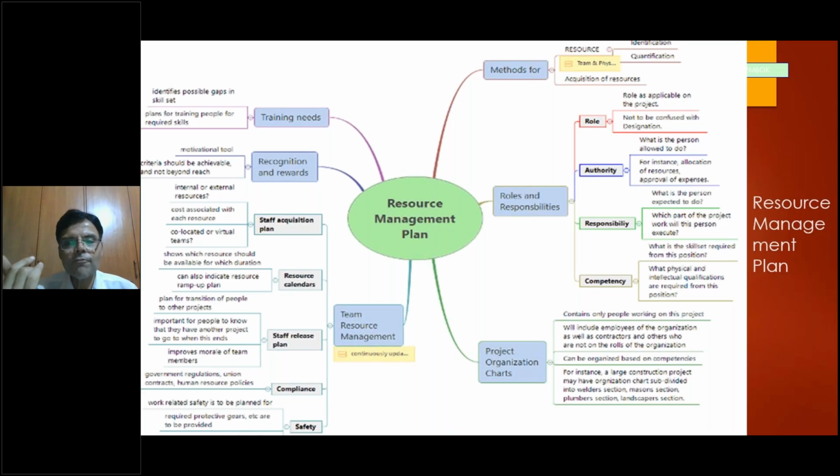First, what kind of people, type of people; quantity will come later. What kind of role will they play? What kind of responsibility do we assign to them? What kind of skills and competencies do they come with? When would each be required, each role, as a typical resource calendar. Each role through this three-year period, which role is required for how long. This detailed planning created a basic framework, the four corners of the wall for us for the first time. I never did this, honestly, in the past.